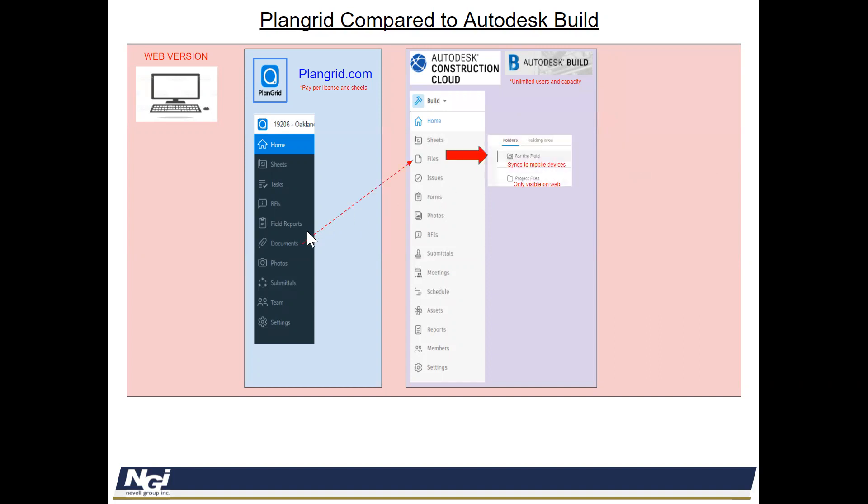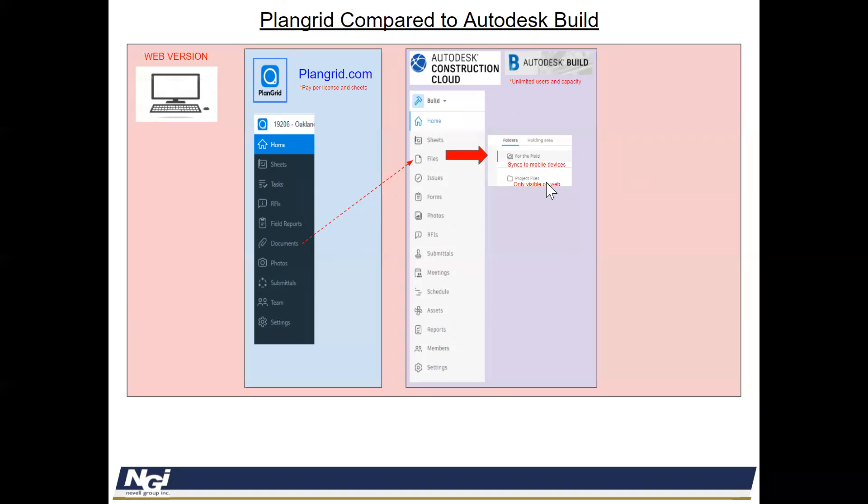One of the other key distinctions was between Documents and Files that in PlanGrid, you just have one big folder and then you create subfolders. Well, in Autodesk Cloud, you have two tiers of folders. Folders that you want to sync to mobile devices and folders that you just want to be visible via the web portals. So you can put in, let's say, change orders or budgeting or items like that inside a project folder, but things that you want shared in the field, you want to file inside of for the field.